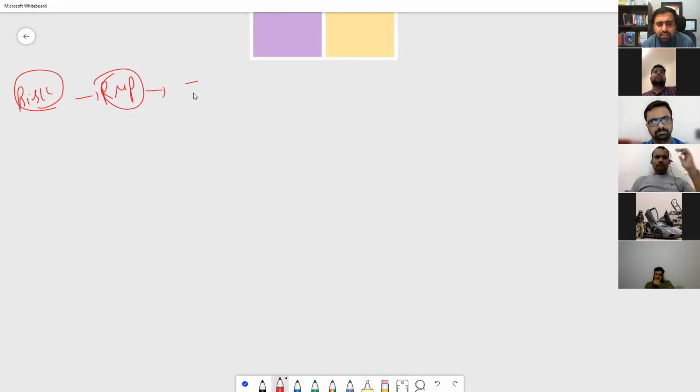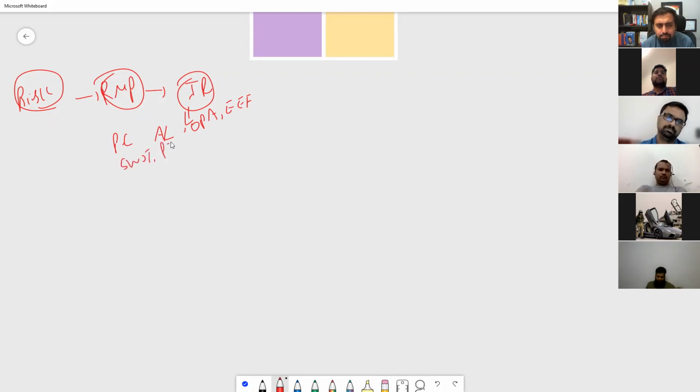Once that is done, you identify the risks. Remember, we made an assumption log at the start. The first thing you are going to use here is that assumption log. Then you use your OPAs, your past lessons learned register. You use EEFs, both internal and external, the project charter, business case, benefit management plan, each and everything. You use SWOT analysis, PESTLE, whatever you can to identify the risks. The more risks you identify, the better. Once identified, you put all the risks into the risk register, where we can put a potential owner and a potential response.